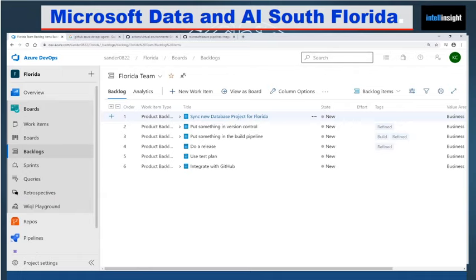By the way, everybody, the standard criteria for an item to be classed as refined in Scrum is that the item is clear and small enough to be part of the sprint. However, businesses can have their own criteria for an item is refined and ready for a sprint as well. So bear that in mind if you go from one team to another that are both using Scrum.